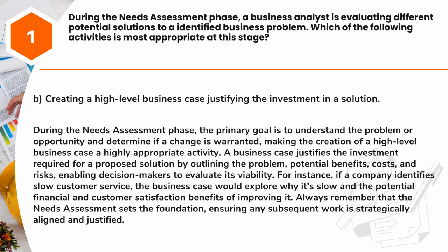Answer: B. Creating a high-level business case justifying the investment in a solution. During the needs assessment phase, the primary goal is to understand the problem or opportunity and determine if a change is warranted, making the creation of a high-level business case a highly appropriate activity. A business case justifies the investment required for a proposed solution by outlining the problem, potential benefits, costs, and risks, enabling decision-makers to evaluate its viability.